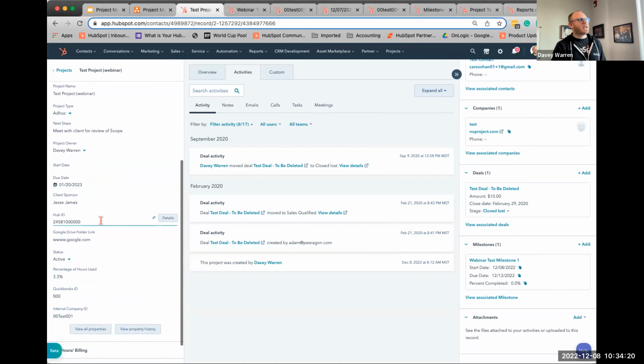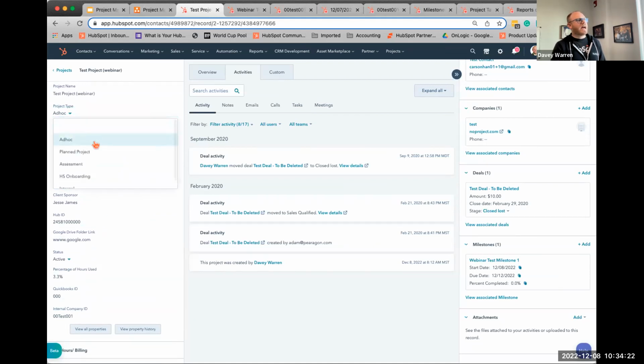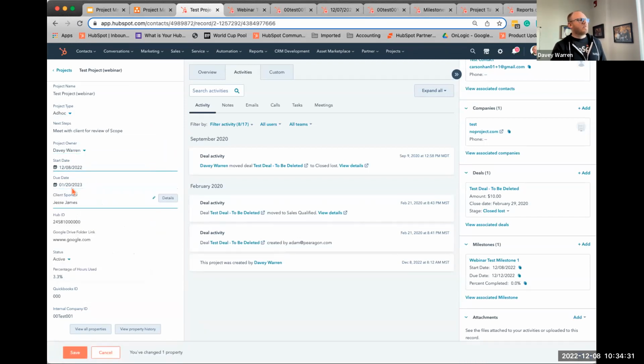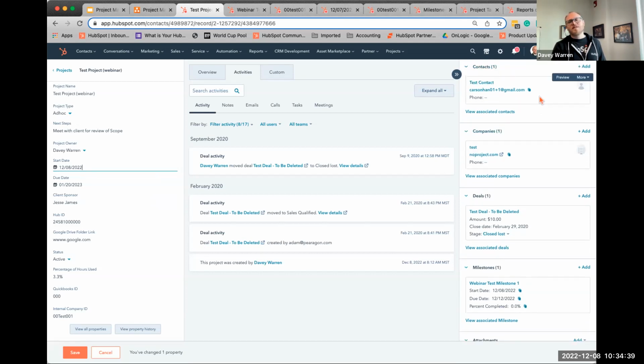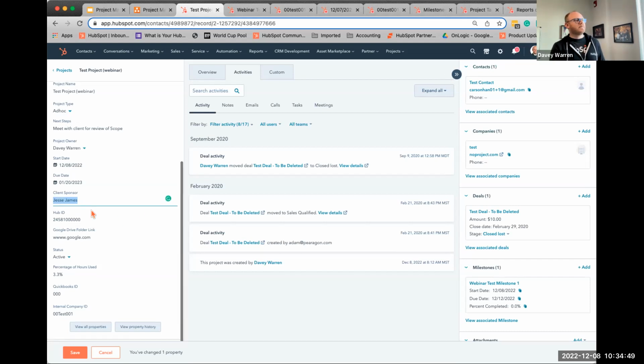I look at things like the type of project we have. Is it ad hoc, assessment, onboarding? I look at who owns the project. What's the start date of this project? What's the due date of this project? Who's the actual sponsor from the client? So even though I may have a bunch of contacts over here and I can use associations, which is cool, we've been doing this for a while now, so it's still here is who's the actual client sponsor. So if everything goes awry, who am I going to be contacting?